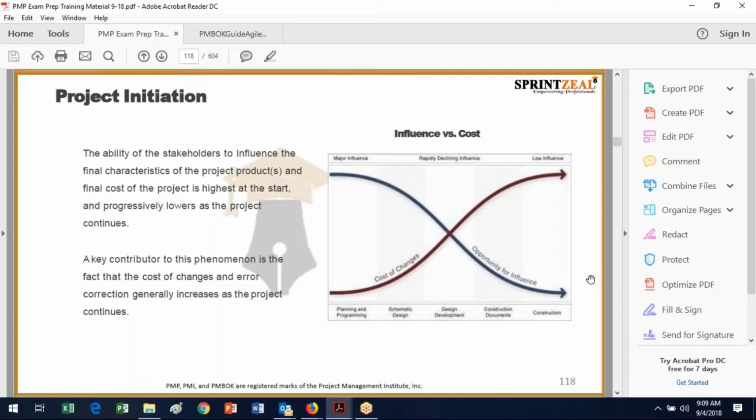It determines how many stories can be built upon that foundation. It characterizes how many square feet can be built, no matter how high you build up. But it kind of starts to lock you in terms of future changes. So the farther along you go, the more expensive it'll be to impact change. So that's why you want all your stakeholders available and on board at the beginning, because ultimately they will be happy with the results that they had influence on. If some stakeholder comes in, say in the middle where those lines cross, their ability to fundamentally change the project will be significantly lessened. That's where you might have an addition to the project or an addendum to the project charter.